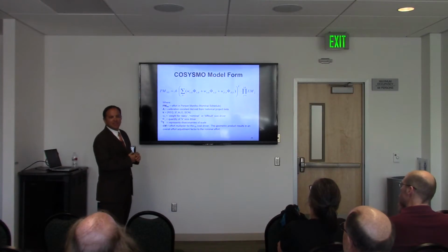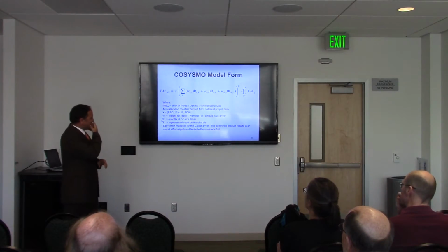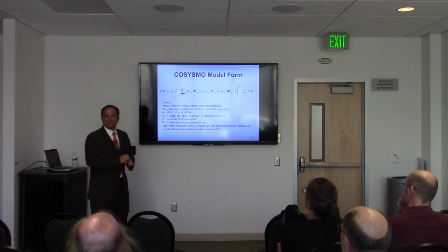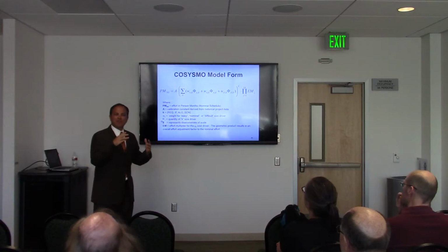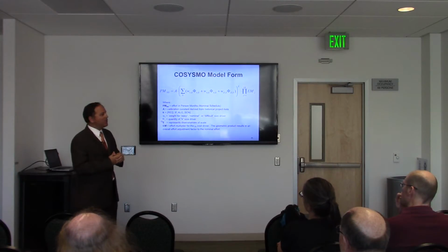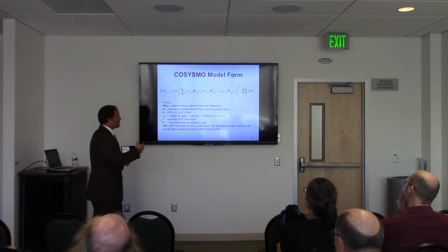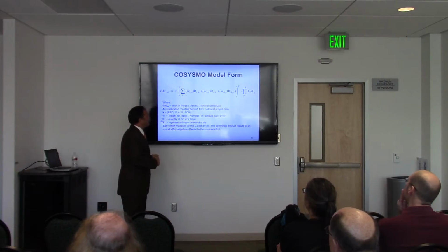Then we have an exponent there, E. In this case, I am sticking to a constant because I don't have enough data to validate. You would need a lot more degrees of freedom in order to be able to test whether you can have variables up there for the nonlinearity. But I know that there is nonlinearity, and I'm going to show you the data in a little bit.